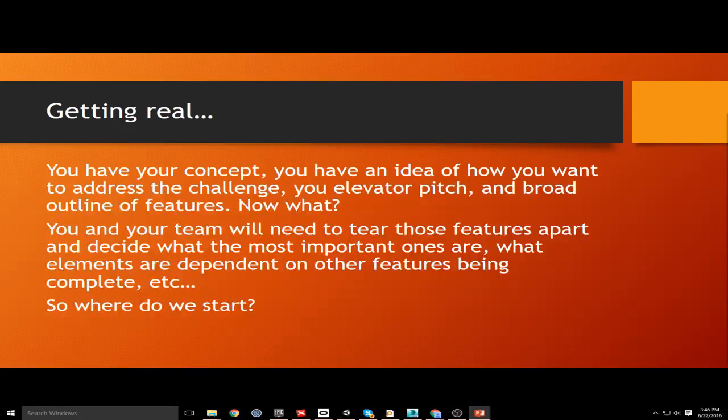You'll also need to identify things like dependencies. A dependency is like, if you were building a structure in engineering, you have to build a foundation first before you can build walls and a roof and all of that great stuff. Well, the same thing applies to any kind of software development and really any kind of project that you're embarking on, particularly in a group. Everybody needs to have a clear idea of what order things are going to need to be done in and why.